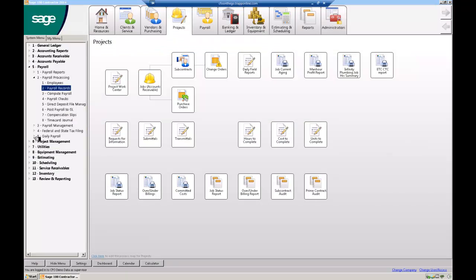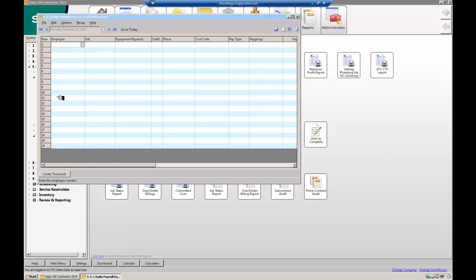Version B is I can actually enter it. If I can get time cards from each person each day, I would actually, in this case, tomorrow, enter all of the payroll for Monday and all the employees and jobs. So I enter Tuesday. On Tuesday, I enter Mondays. On Wednesday, I enter Tuesdays. By the time I get to the following week, I really only have one more day to enter before I process payroll, which is a nice thing. So you could do it that way.